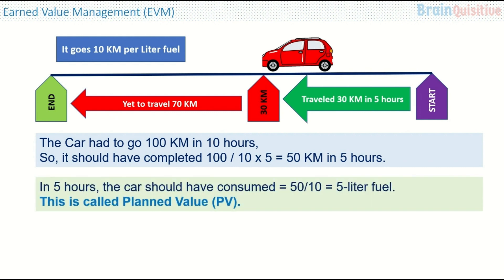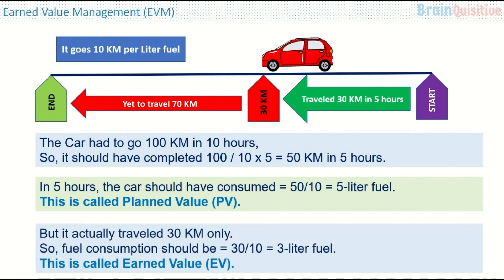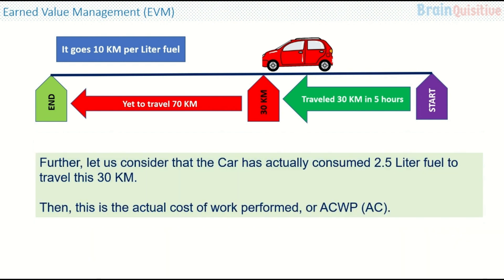But the car has travelled only 30 km. In 5 hours, the car should have consumed 50 divided by 10 — the distance to be travelled divided by the mileage — that is 5 litres of fuel. This is called the planned value. But it has actually travelled 30 km only, so fuel consumption should be 30 divided by 10, that is 3 litres of fuel. This is called the earned value. If the car actually consumed 2.5 litres of fuel to travel 30 km instead of 3 litres, then that is the Actual Cost of Work Performed, or ACWP.